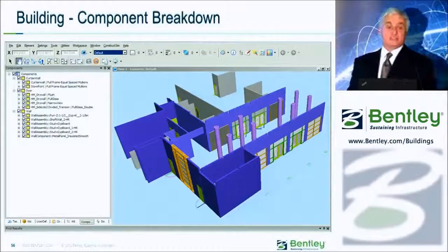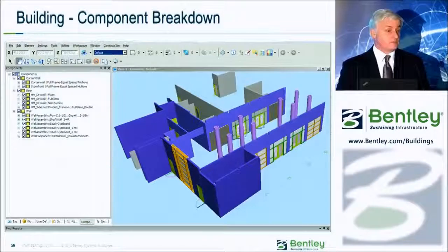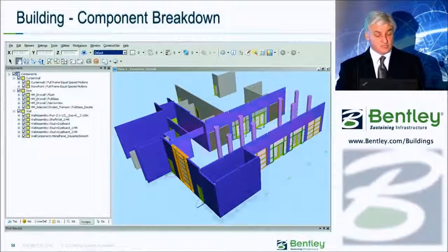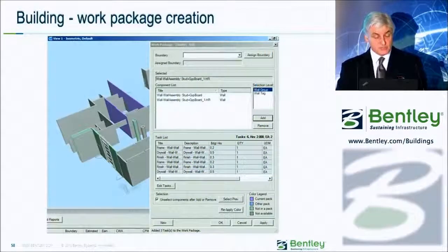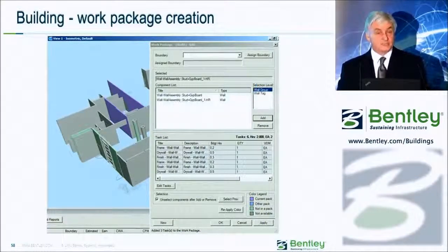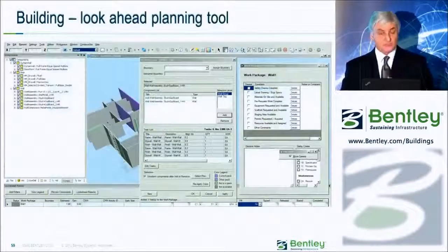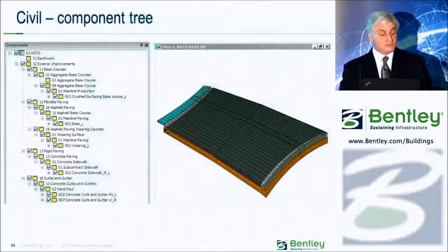Right, yes it does. We've been testing it, we've tested it with Revit, we've tested it with our own products. So we can bring these things in, and again, this is now looking at a Revit file here. We're able to break the things up, normalize all the content. We're able to apply activities to those so that as you're adding elements to it, it adds up. You can do look-ahead planning, you can do a constraint analysis on those activities, we know that works. In the civil world, we've tested it on other things, and that works in the civil world.